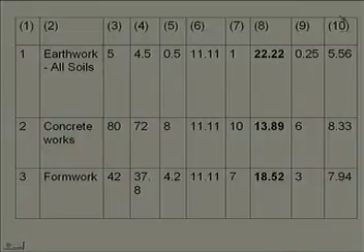Whereas if you see column 7 and column 8, column 8 I have shown in bold face letters and it shows 22.22%. This is the markup percentage I was telling you. Now what you find, I am quoting it at double the margin of uniform loading.